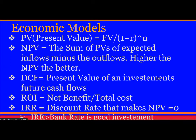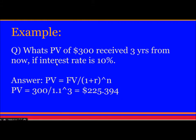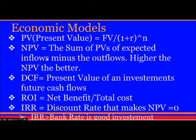Higher NPV is better. From an exam point of view, if NPV values are given, simply select whichever project has the higher NPV. DCF is Discounted Cash Flow, calculated as the present value of an investment's future cash flow. ROI is Return on Investment: Net Benefit divided by Total Cost. IRR is the discount rate that makes NPV equal to zero — if IRR is greater than the bank rate, it is a good investment.